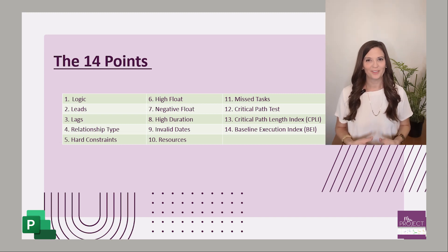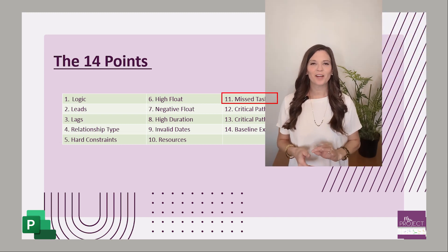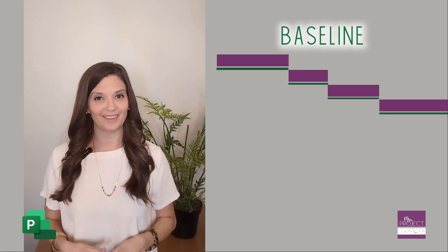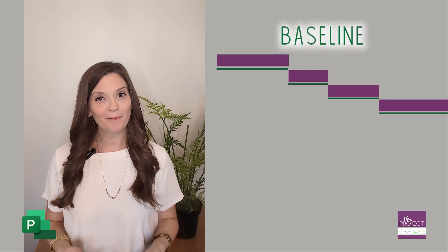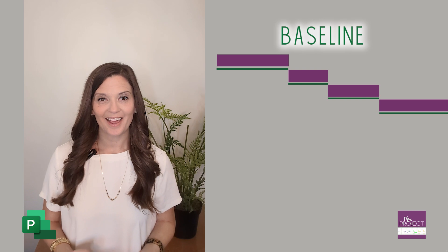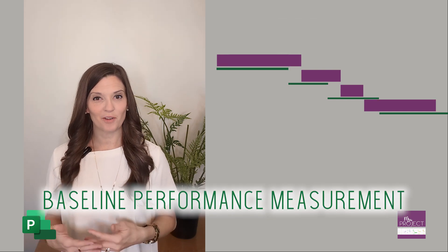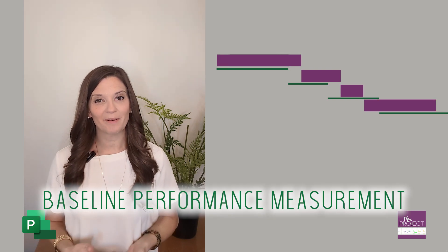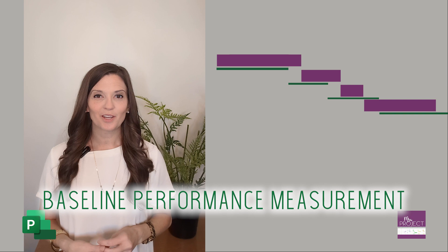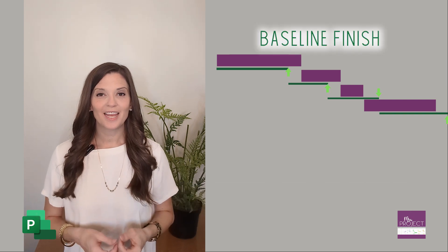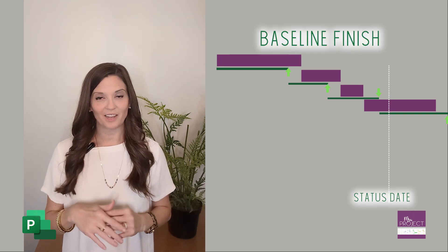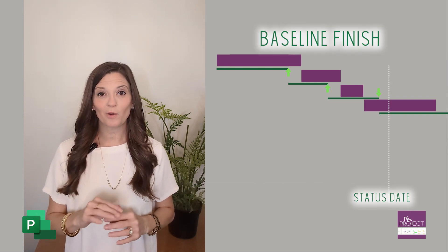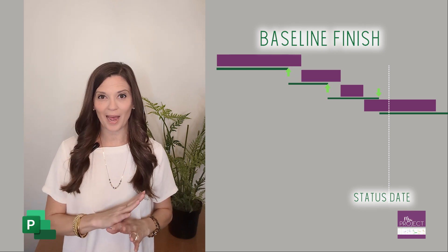Another schedule health metric is missed tasks, and this is a retrospective look at your performance against your baseline. At the beginning of your project, you're setting a baseline to say this is what our plan is. Now we're going to be looking at how you're performing against that baseline. A missed task is looking at your baseline finish that is on or before the status date - it could be today, or you can pick a date that was in the near past.